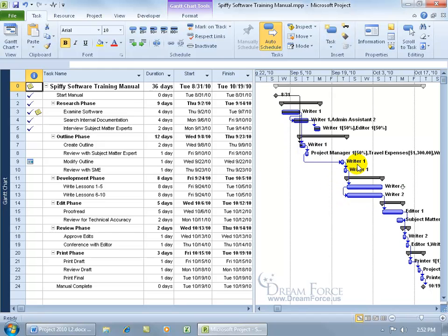And was it because we had resources that we didn't use before? Maybe they're not as good. In any case, you can go ahead and go to that point in time by looking at those set interim plans. Now, you don't need to set a baseline in order to set your interim plan, but to me it only makes sense to set a baseline before you begin your project so you can later compare your interim plans against. So if you haven't set your baseline, then go ahead and do it, but I already have mine set.